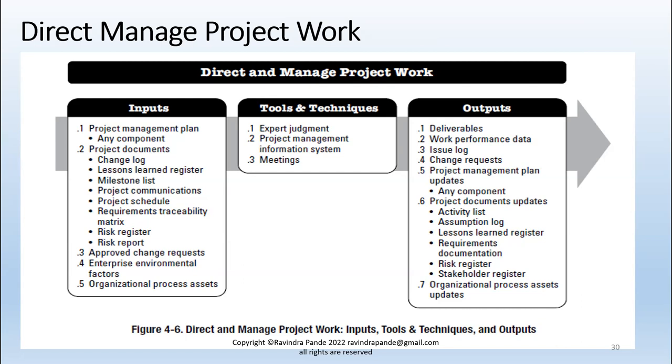So here what we are trying to do, this is called time and material. The more time we spend, the more material we spend, we can charge similarly to the client. So this is at actuals. Okay, so there are these two basic categories, time and material and FP, and there are many in between, because nowadays we use hybrid project models, right?